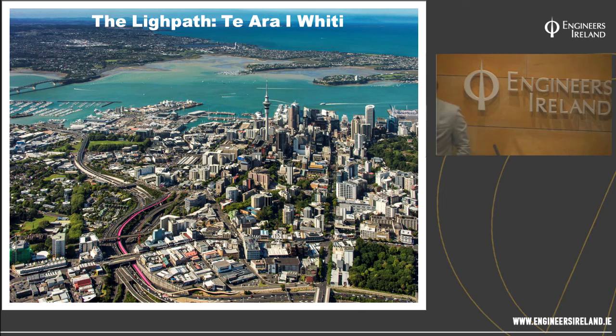Yeah, I can answer this. Probably, I didn't really cover that well. There was a city centre, central motorway cycling and walking plan in 2012 that identified this as a potential cycleway. So that was its first mention, and then it wasn't until the minister confirmed that he would like to see it opened that we really knew that it was going to go ahead. So no other work really had been carried out up to then. Okay. Fair enough, thanks for that.